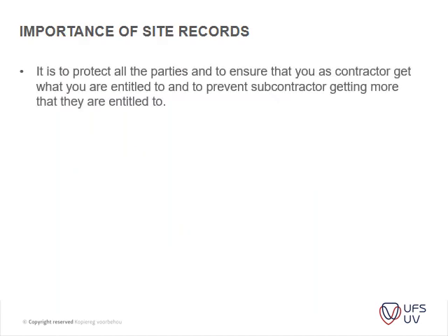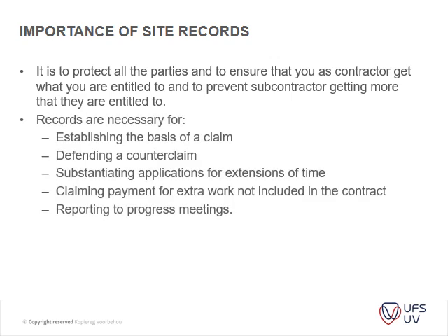Importance of site records. It is to protect the parties and to ensure that you as contractor get what you are entitled to, and to prevent subcontractors getting more than they are entitled to. The records are necessary for establishing the basis of a claim, defending a counterclaim, substantiating applications for extension of time, claiming payment for extra work not included in the contract, and reporting to progress meetings.